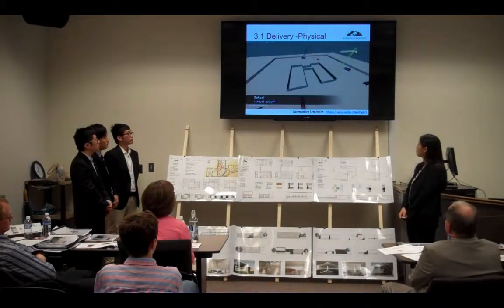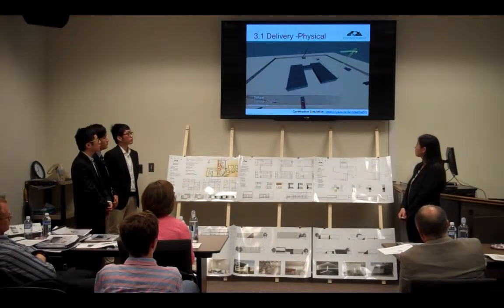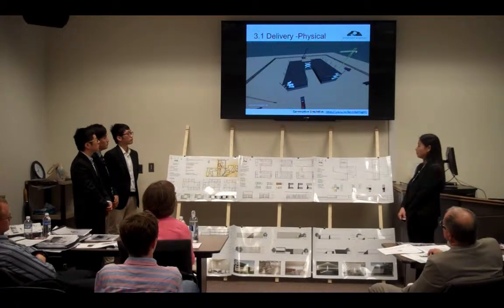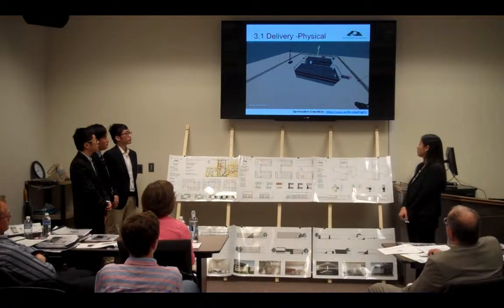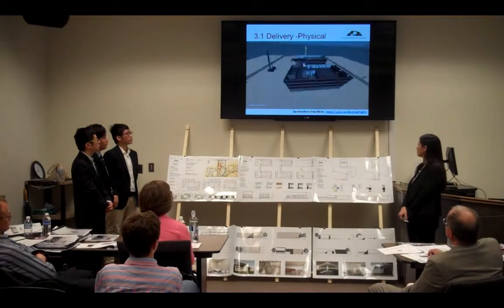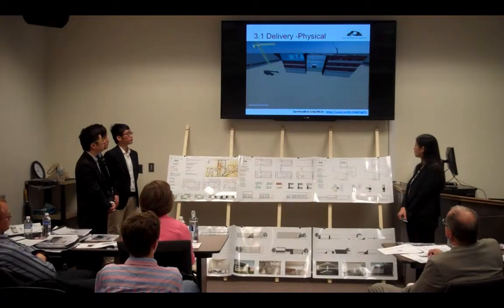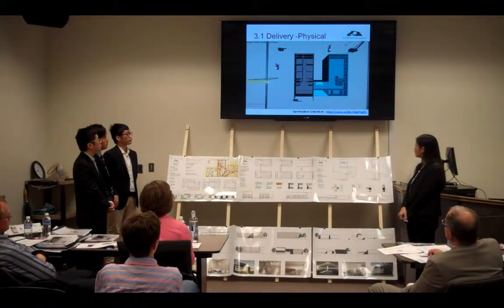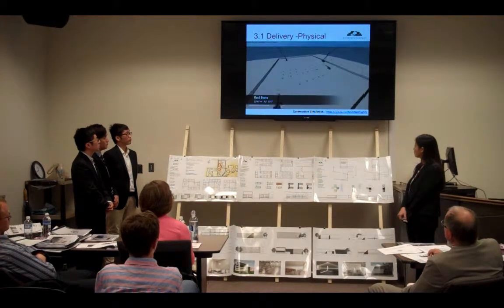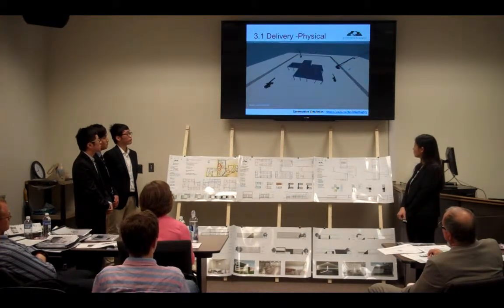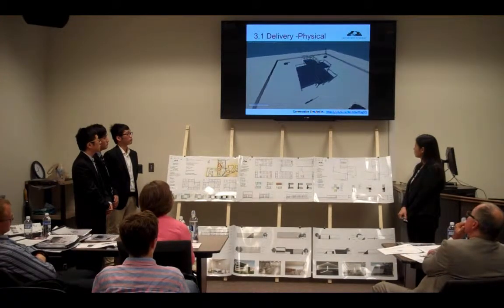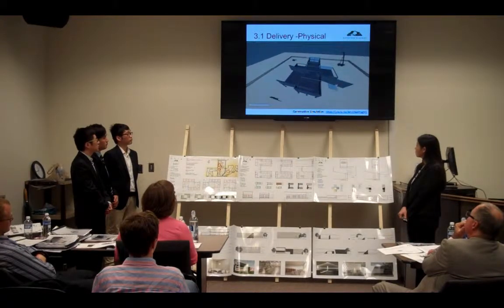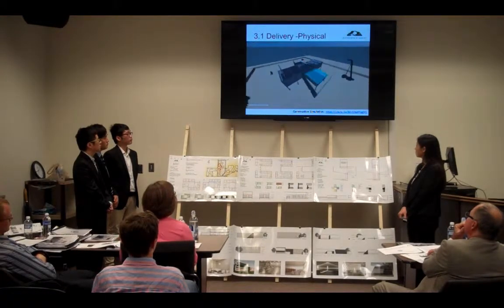Here is the construction simulation of the school. This work will begin December 11, 2015, and the duration of construction is about 350 days. It is a three-story building, and the type of building is reinforced cement concrete. The construction of the red barn starts March 4, 2016, with a 310-day duration. The construction includes isolated footing, tilt-up wall, and reinforced cement concrete structure.